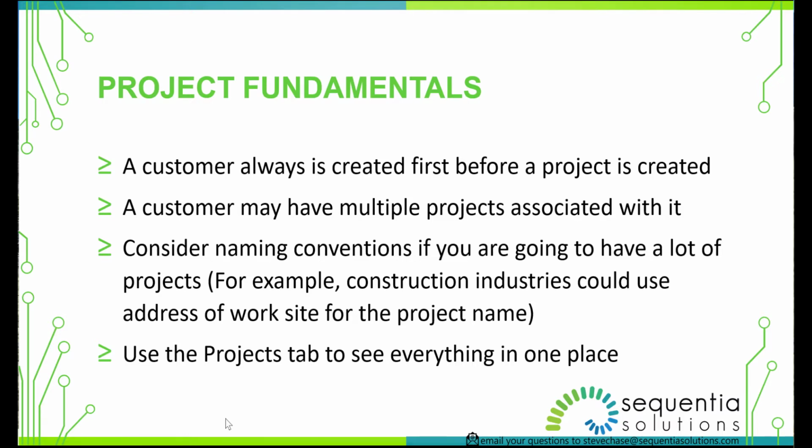So one thing to note is that you must have a customer created first before you can create the project. That's because a project is essentially a sub-customer, okay? It's very possible that you can have a customer with more than one project. You know, for example, if you're doing construction and you're remodeling a customer's basement, you could have a basement project and track all your costs and income associated with that basement.